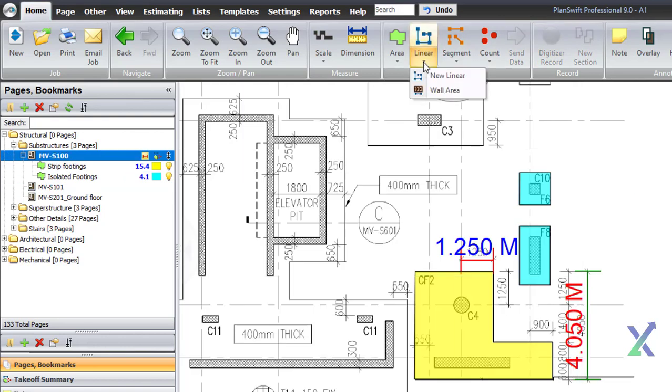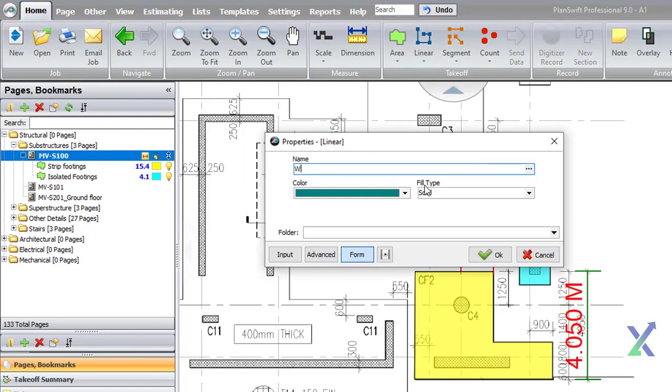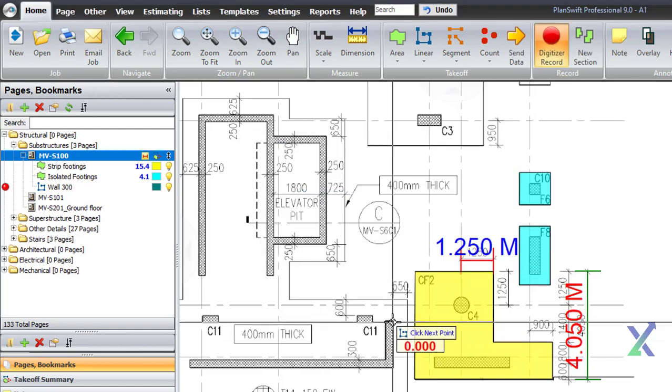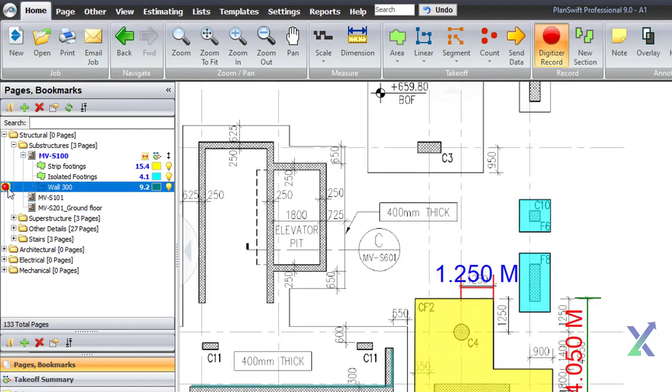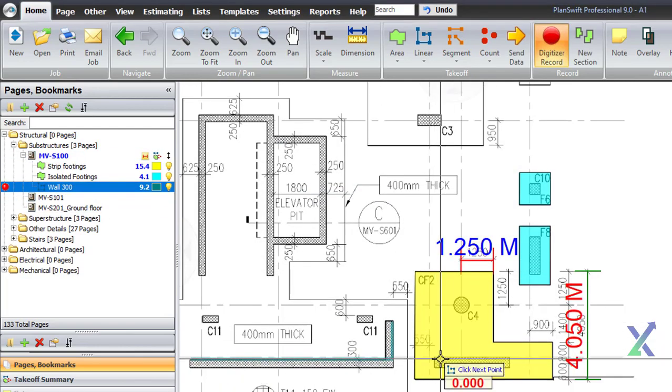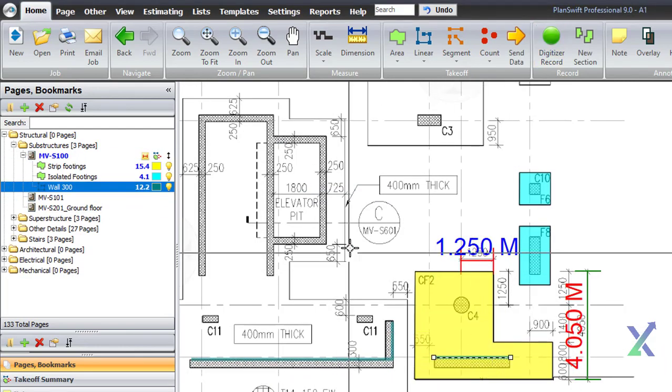For walls, I prefer using the Linear tool to measure the total perimeter of the wall and then calculate its weightage against the total concrete wall perimeter.